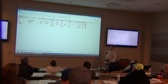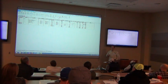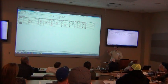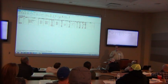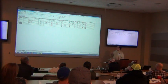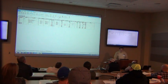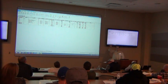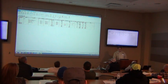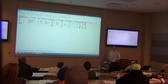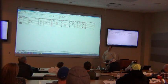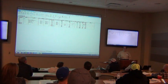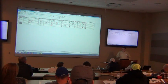This is also critical for clients that do a lot of negotiated work — what can we take out to fit this into a certain budget window? That way I'm not guessing. I can actually tell that a line item that looks like $272 in cost will actually affect the bottom line by $318 if we decide to pull it out. I can see how much that value is on each line item pretty quickly.